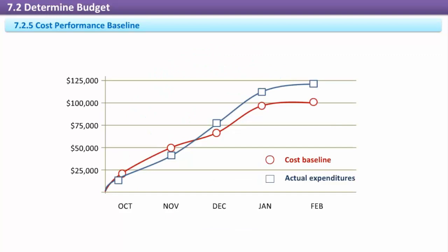The project cost baseline can effectively show many different views of project performance. Because it's such a useful graph, a project may have several different cost-related baselines that will focus on specific cost categories, such as labor costs, raw material costs, or any other cost classification that's necessary for monitoring. Just as with all other baselines, the cost baseline reflects all approved changes.